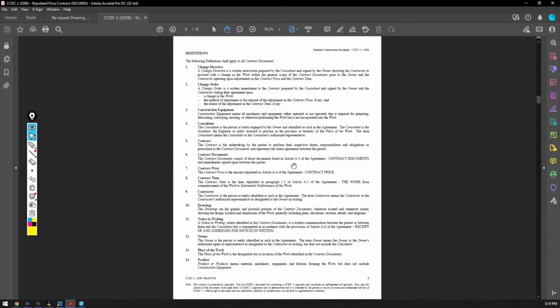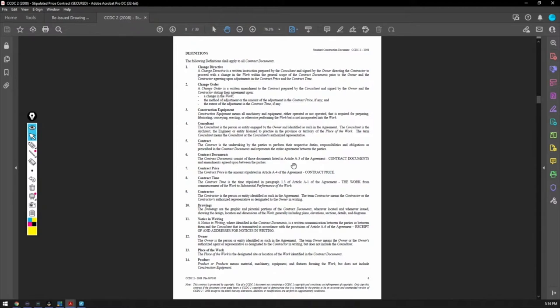And that way, if they put, like, say, a six addendum out, and you didn't get it, well, you're off the hook right there. Because you said, oh, I'm sorry, I didn't price that. It's clear in my quote that I only priced addendum one to five. So you got to put down what you read and what you based your price on.